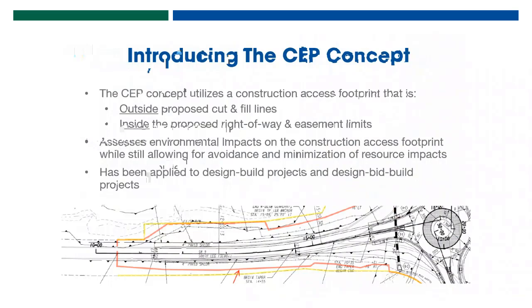That using corrected PFPR plans, we could anticipate not only the contractor's access, but potential tweaks to the design. And so effectively anticipate the quote unquote elbow room needed for access and the reasonable maximum extent, if you will, of riprap along stream banks, which is a permitted activity if it gets below the ordinary high water mark. And so by anticipating those impacts this early in the process, coming out of PFPR, we have an opportunity to make application for permit authorization and have that out of the way well before it becomes the critical path.